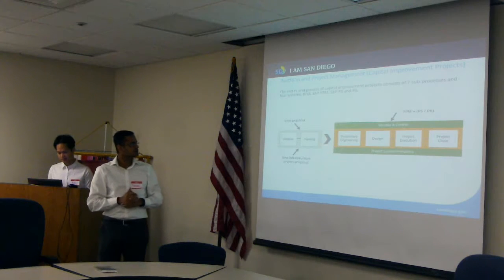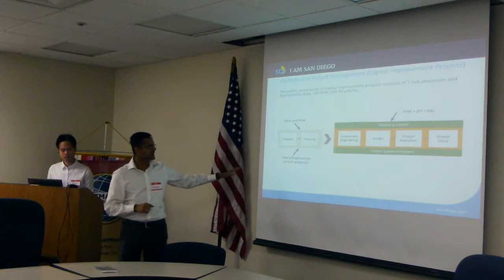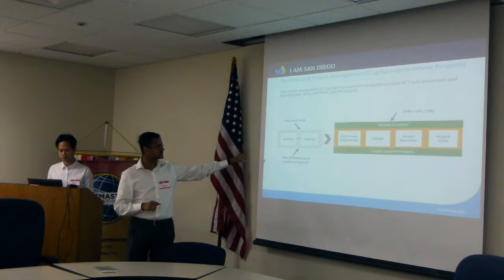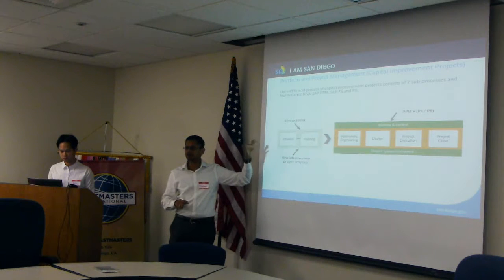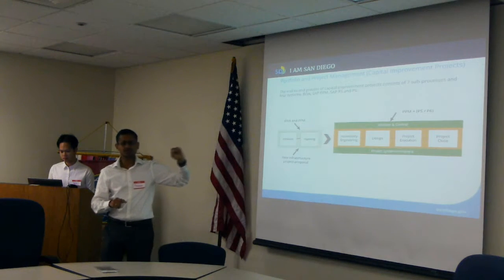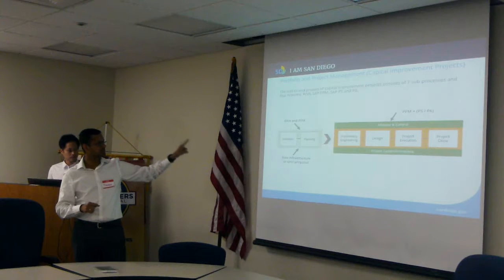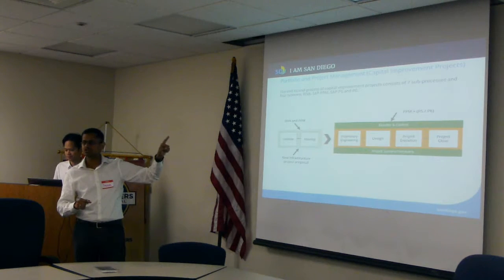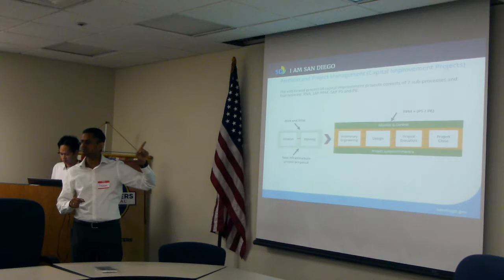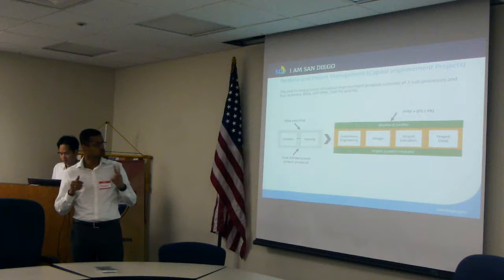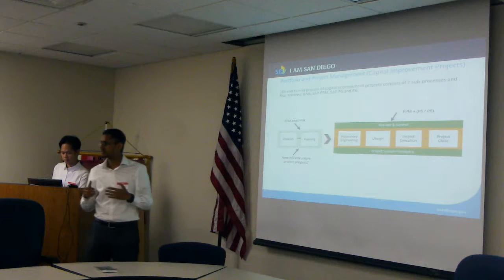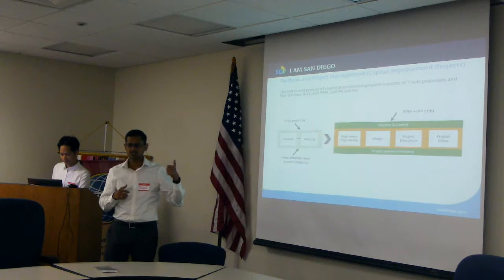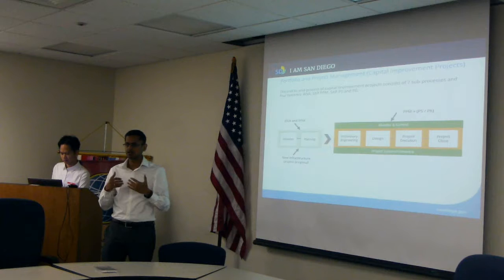Yeah. So this slide talks about the life cycle of a project, where it starts from initiation. We said the initiation starts in a system called Riva. Now here you have 4 systems that are talked about: Riva, PPM, project systems, which is PS, and P6, which is Primavera P6. The city currently has 2 tools, which are PS and P6. People executing projects will be familiar with these 2 terms. One is project systems. It's already an existing tool that the city is working on.